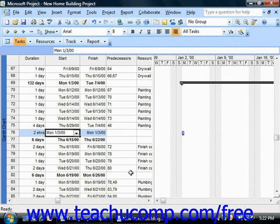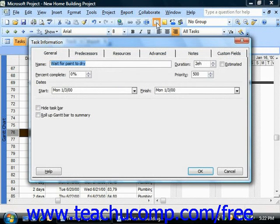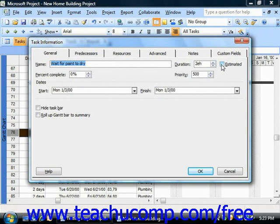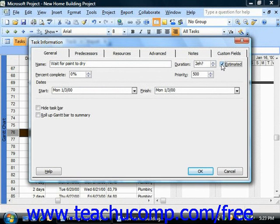Also note that if you're using the task information dialog box for task detail entry, you can check the estimated checkbox next to any duration that you enter in order to explicitly define the task as an estimate in the task list. Of course, the durations of many tasks in many types of projects are estimates, but checking the estimated checkbox simply adds a question mark to the end of the duration time. This gives others a visual indicator that the time shown is just an estimate.